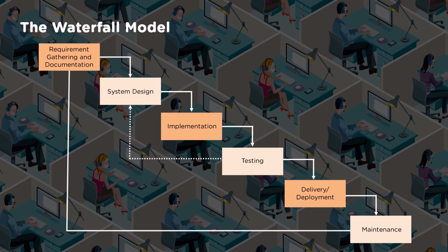Now once the implementation starts, if you find any deviations, the correction needs to be done. Since the design is in detail, the deviation possibility is as less as possible. But the challenge comes up when the dynamics in the market, when the dynamics of customer changes. Customer asks for change, then you may be required to do the change. Now, when you want to do that change, you may be required to do that change only after understanding what would be the impact of this change in the entire output which you're going to create, which is very comprehensive one.